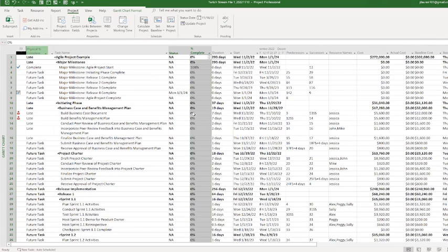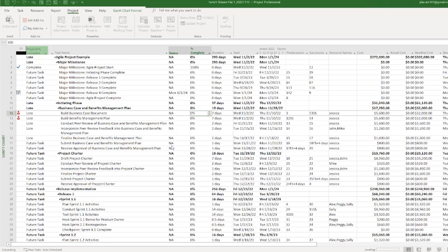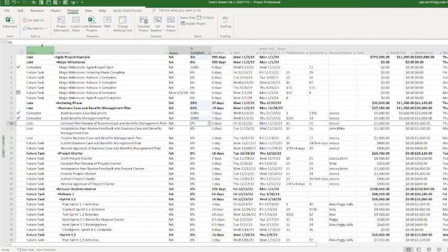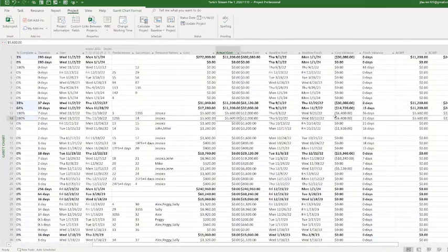Okay. So, now let's have a little fun. Let's say this is 100%. Yes, this is 100%. Now, see, certain columns have shifted. Not just the status indicator and the status complete, the status itself, but look at also the actual cost. You see the costs have adjusted. And then of course we got the variance column over here. So we were under budget technically for these two tasks.